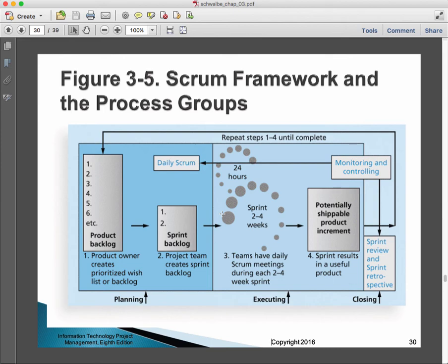To the extent that we have additional work to be done, we add it to the product backlog. If they love everything just the way it is, then there's nothing to add. If we didn't get everything done, the things we didn't get done go back on the product backlog. If some things need to be revised, we come up with some expression of them and put them on the product backlog.